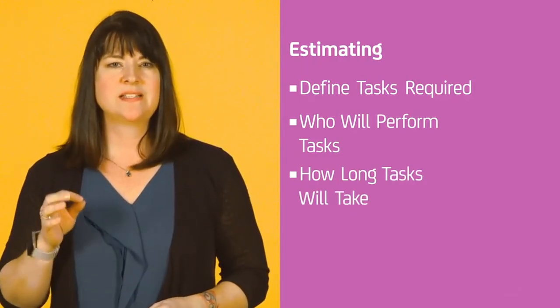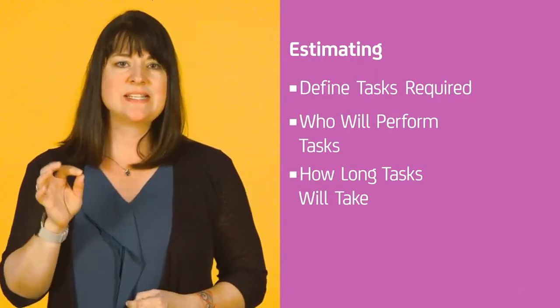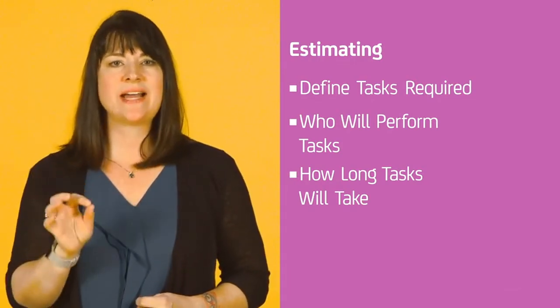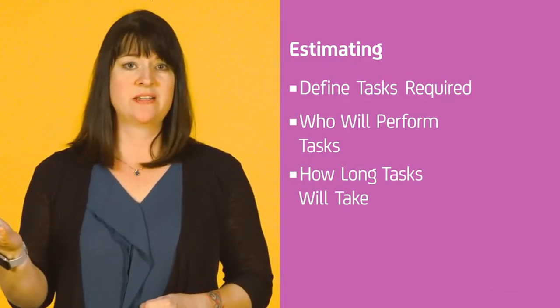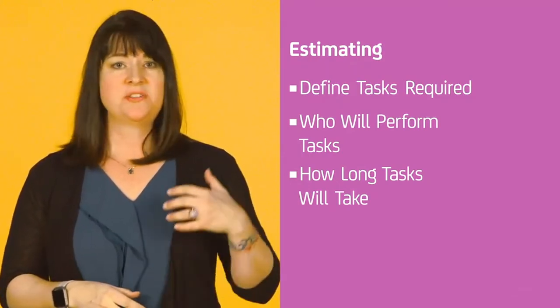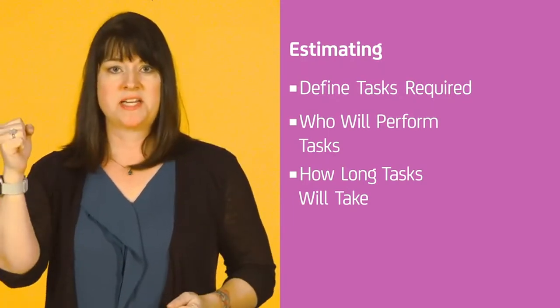Notice that sizing is a whole-team generic assessment of the effort. Estimating takes into account exactly who's going to work on the story — will we let the junior person take a little bit more time, will we stretch someone's skills, will the team expert knock out that task quickly? Estimating often happens in hours; it's a more refined estimate. We don't expect the previous sizing and points to translate into a specific number of hours, because now we have more information.